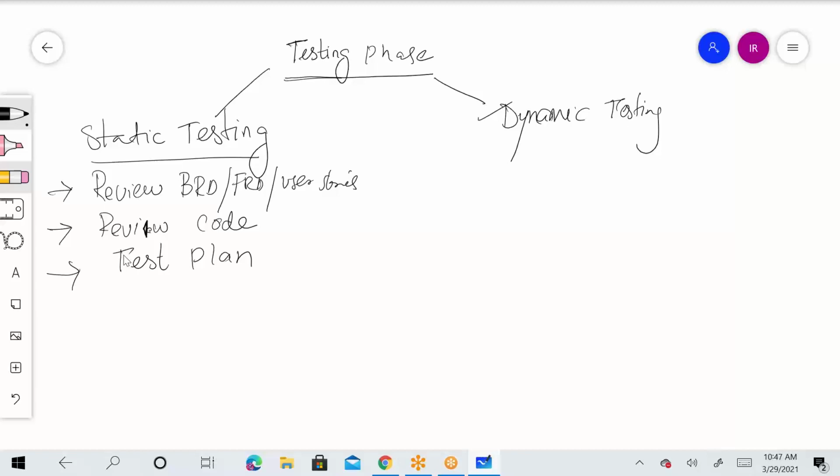One is BA testing, another is development team testing, third is your QA testing, and then users' testing. So when all these 4 parties are going to be testing this application, the test plan should include all these 4 test phases, and if you are writing this document, you need to talk to these individuals and get the information to fill up this template. But in most cases, your QA team is responsible for delivering the test plan.